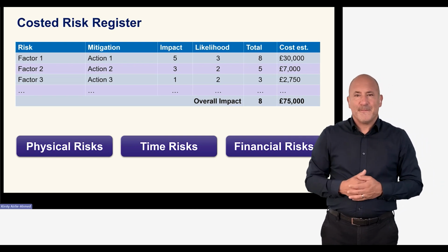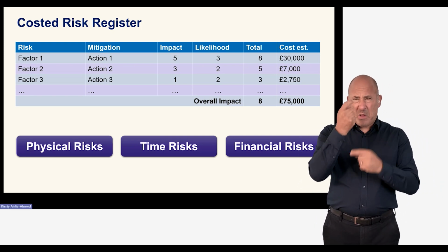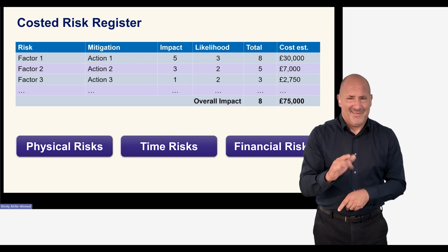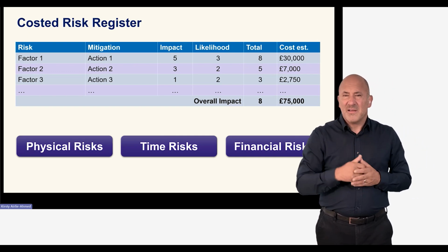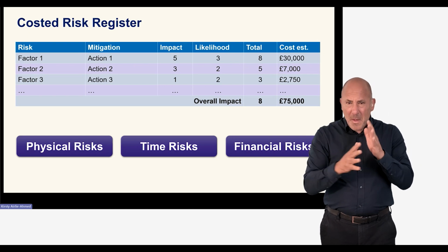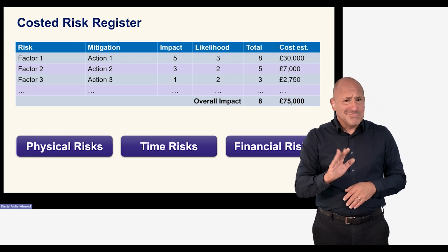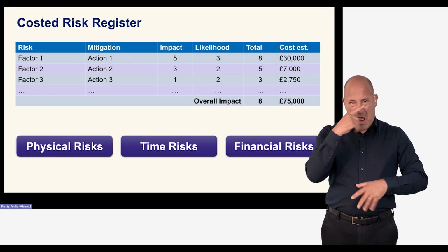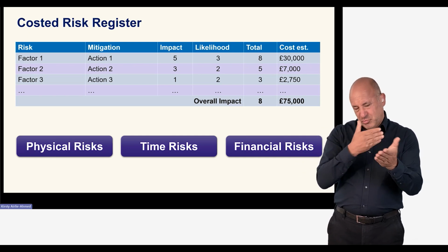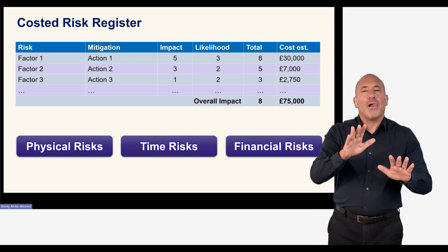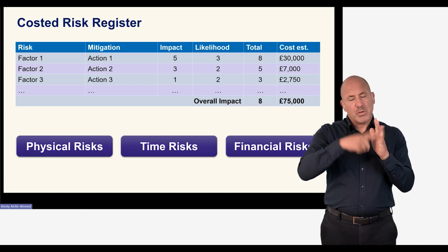So if there's very little detail in your risk register, we won't assume it's a low-risk project. We'll assume you're not prepared. If there's a lot of detail in your risk register, we won't necessarily assume it's a high-risk project. It can actually give confidence in your ability to spot and manage risks throughout the life of the project. This is a useful exercise and should form part of good project management.